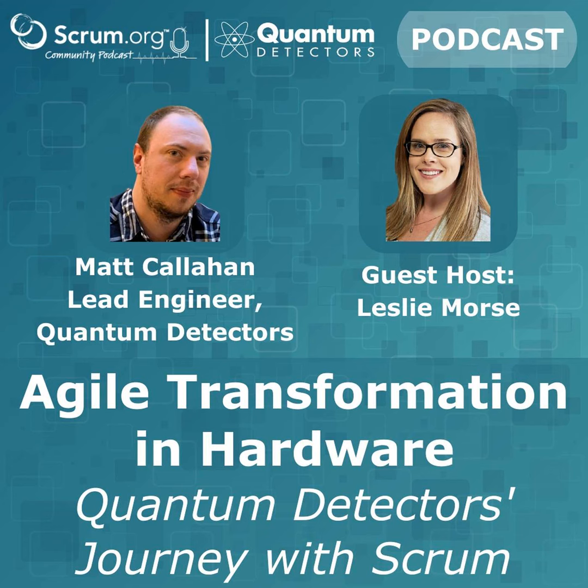With hardware, what we found with sprint goals was that they were becoming really difficult to formulate. Whilst we could easily come up with sprint goals, a lot of them would be, oh, complete X, Y, Z by the end of the sprint, and that's not really a good sprint goal. The challenge is that you've got people from different domains, and we're a cross-functional team, but one person has, let's say, electronics experience, another has software experience, another has mechanical. And whilst everyone has a good appreciation of the skills and the craft that other people have, I can't say to the software engineer, right, now you go and design this mechanical enclosure.